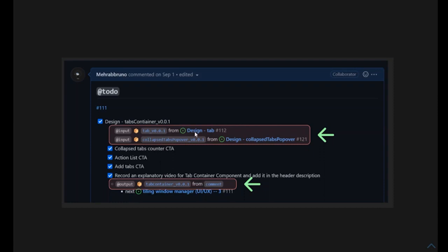For example, if you need this task group in order to finish the output, what you do is you link this output from this issue, which is being produced from there, and then you use this input document to produce your next output. So therefore, this input has to be listed before you start working on this, and that other issue work has to be produced before you get to the second work of your issue.